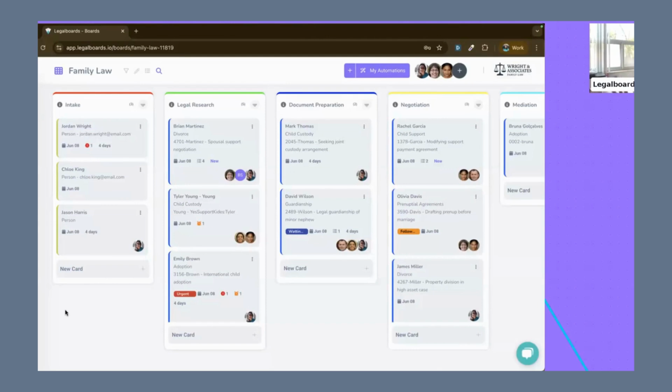So what is the first key information that a Kanban style brings to me? It's very easy to visualize. When you look at this workflow, if you think that this is a firm with about 3 team members working here on this family law case, you can see that we might have a bottleneck here at the legal research, right? We have 5 files here. We just have a new one coming here today because this is new. And I just have 3 people working here. So I might need help. And this is something that you can address before some files slip through the cracks.